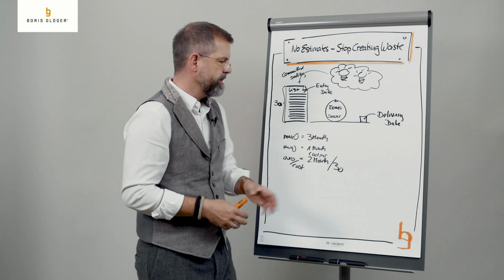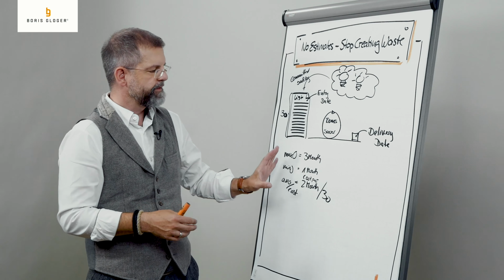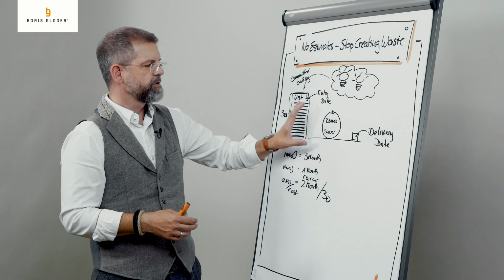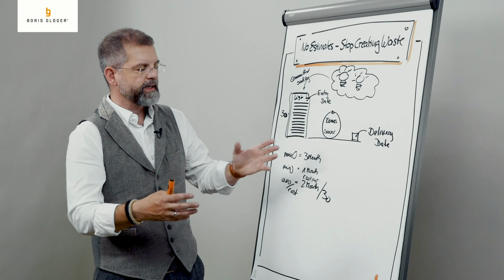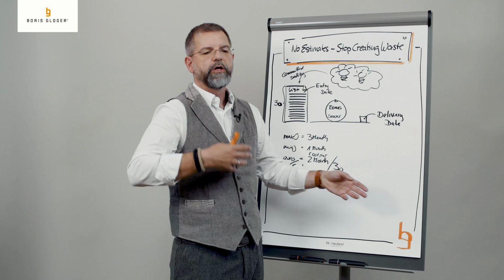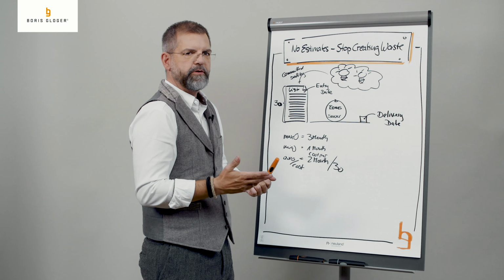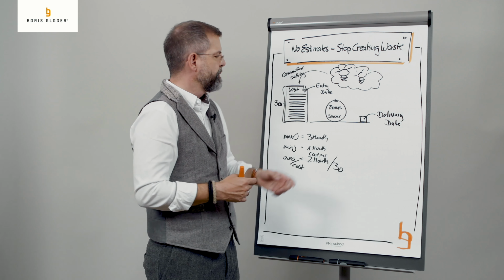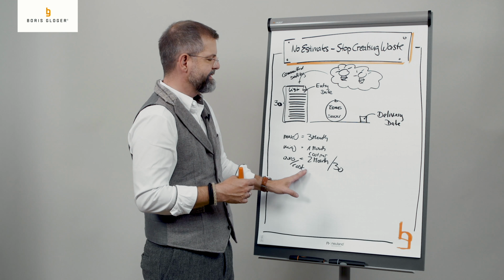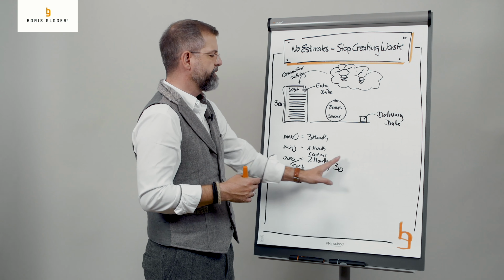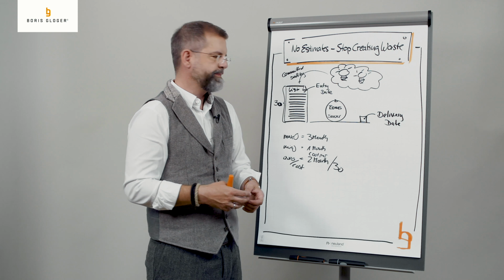Yet it might happen over time that you deliver less frequently, because your teams might get stuck or get ill, or a server is out of order in your organization. That might happen, but you will see it after a specific amount of time, because then your average cost per item goes up.